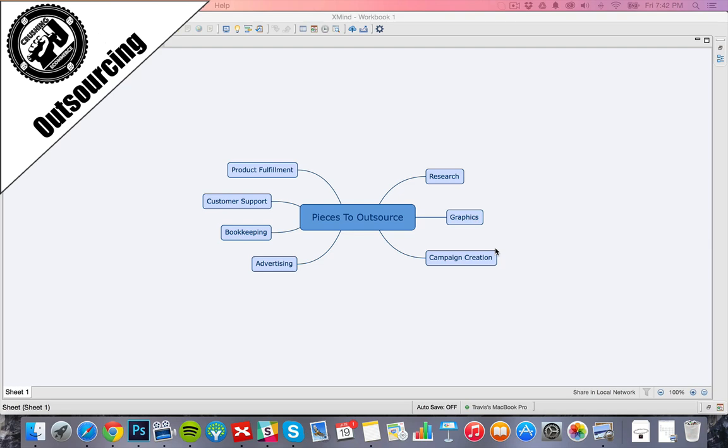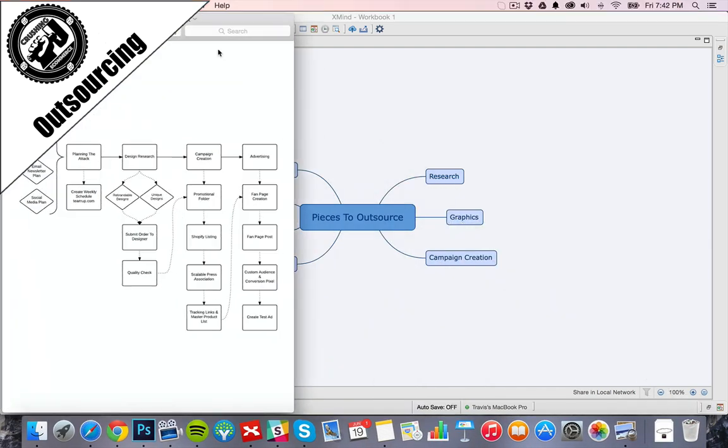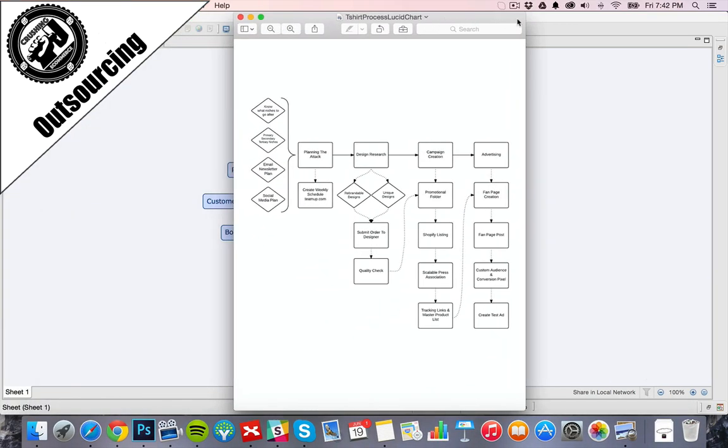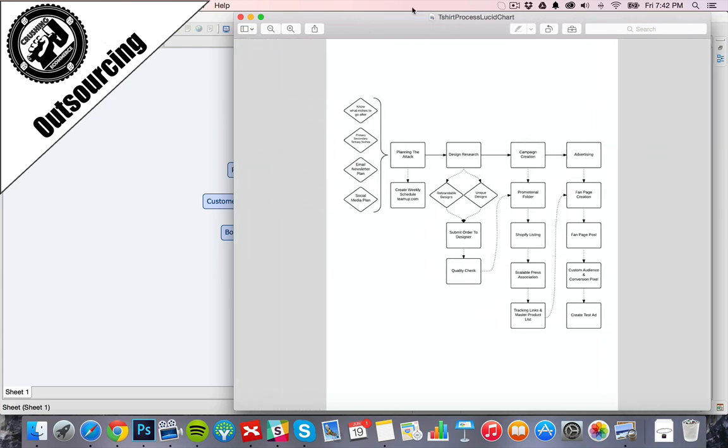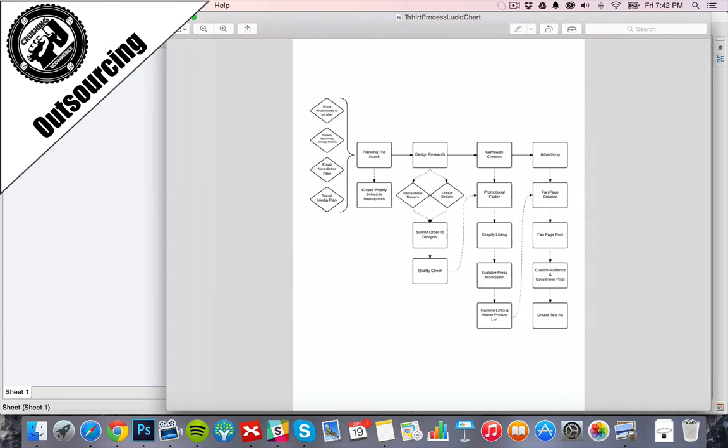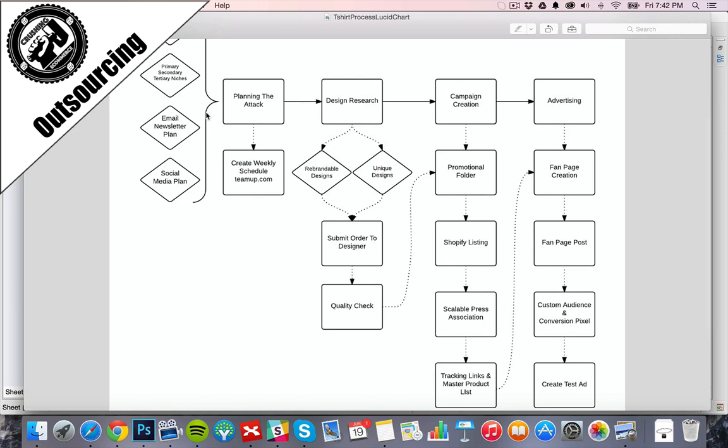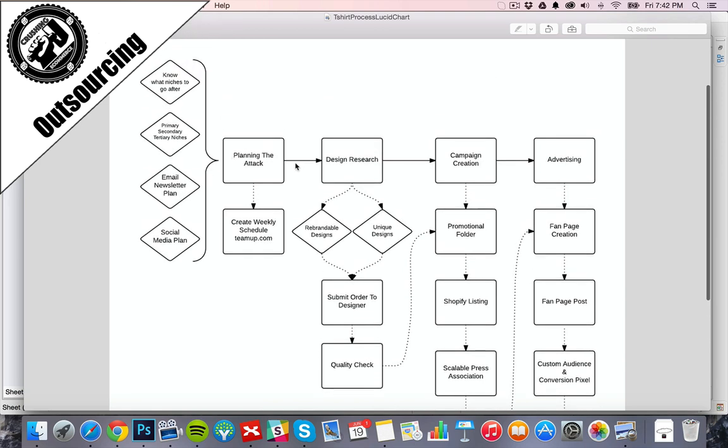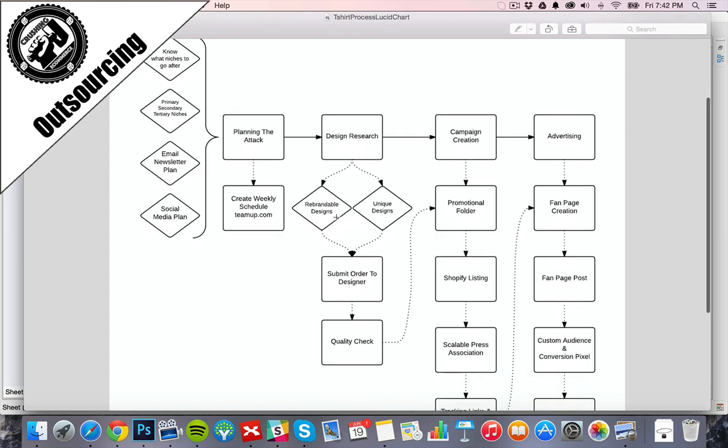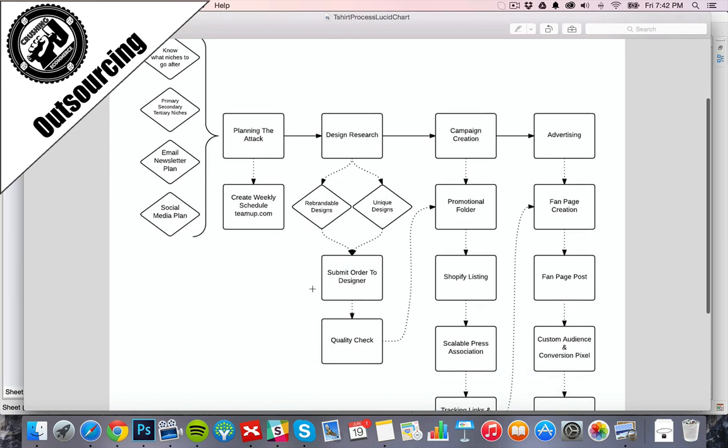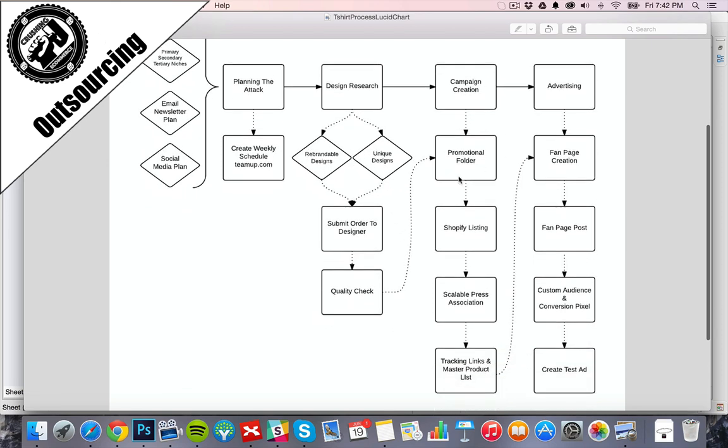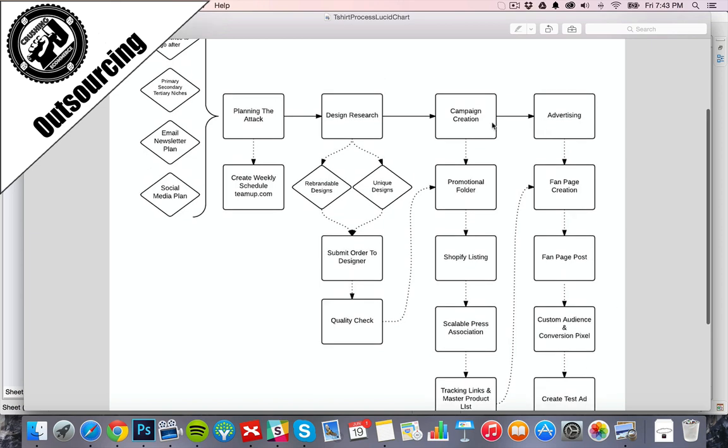We have it broken down first off into a process chart so that everyone can kind of know what's going on. So I'll dive into this. This is for the t-shirt business process. We have four different kind of steps to launching t-shirts. We have the initial step is just kind of the research and planning the attack. Next off we get into the graphic design step and this is where we submit our design ideas to our graphic designer, they submit us a first draft to a Google Drive folder, we do a quality check, it moves on to the next step campaign creation and we have our step-by-step process here they follow, this moves on to the advertising team which has their step-by-step process here.